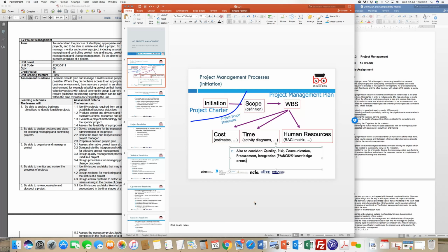So for example, if you do not plan costs well for catering, and you've only ordered or done catering for about, say, 10 people, then you have not taken into account that with the kids, you'll also have parents who will be accompanying the kids. So if you plan for 15, that means you need to know if there is 1 or 2 parents coming in, and then you accordingly plan catering, and that will affect your cost.